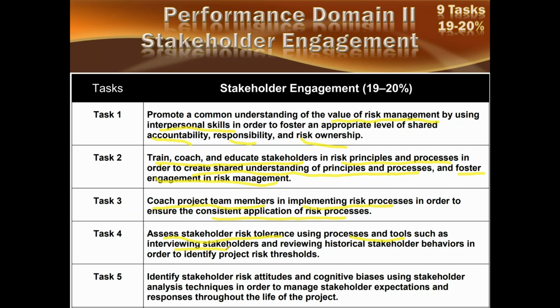Interviewing the stakeholders, reviewing the historical stakeholder behaviors. And why do we do that? To identify project risk threshold. When I am assessing the stakeholder risk tolerance, I am trying to establish the project risk threshold. Right? So there are 4 or 5 items I have underlined here, and these things can come out as questions.